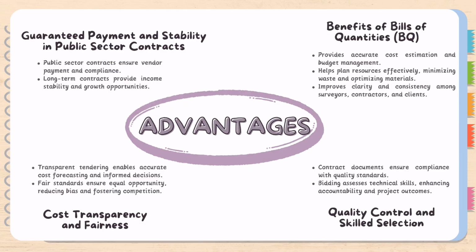explained. The contract documents and bills of quantities provide essential details, including the rate schedule for building elements, total project cost, material and labor rates, contract period, and defect liability. Quantity surveyor firms gather this information from tender documents and bills of quantities for ongoing and future projects.